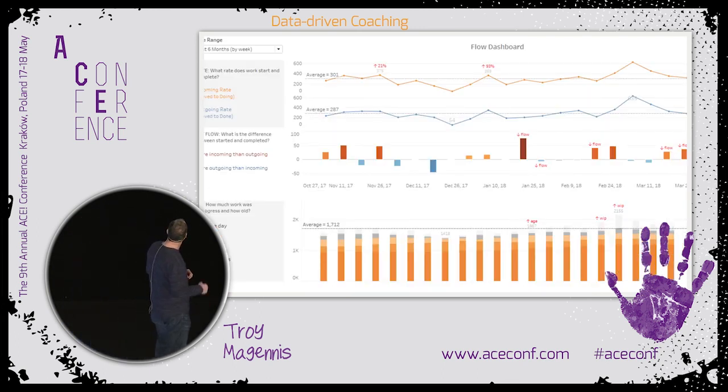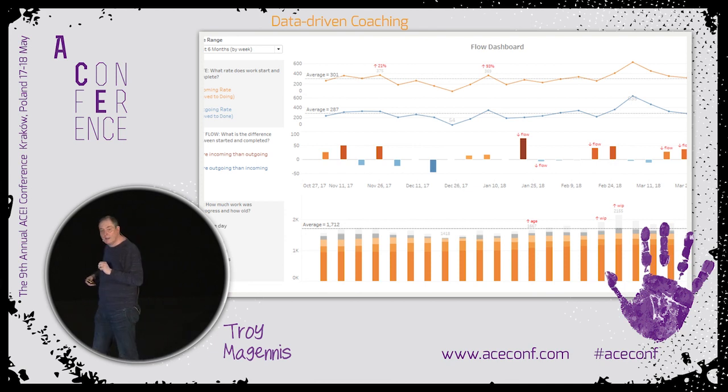I think I do the same thing in this one. Again, I show multiple charts, but I put these little markers on them. So I'm saying ignore, there's not enough significance here. This means that a long-term average, more has been started than finished over the previous 4 weeks. So it's not just a simple calculation. I asked people when they knew they were off the rails, and I turned that into a set of markers that I could show automatically to try and capture the business knowledge where I wanted to force a discussion to be about.